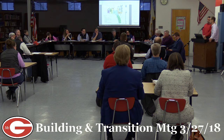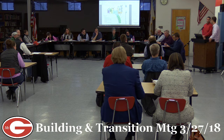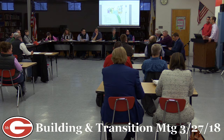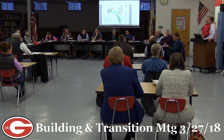You're admittedly already razor thin in your schedule. So if anything goes wrong, a broken piece of equipment, an air quality test that needs to be done a second time, a sprinkler system that doesn't have the right pressure. I could give you dozens of things that have happened to us in schools that we've worked in that are just out of everybody's control. There are schools where everybody does everything right, but it just doesn't work out the way you want, especially when your schedule only gives you one shot at the end to get all of the parts right.